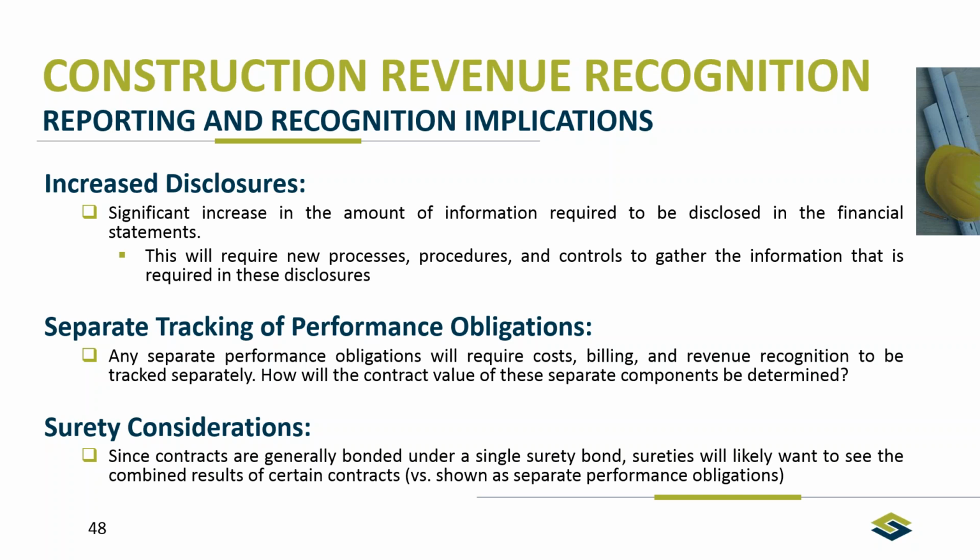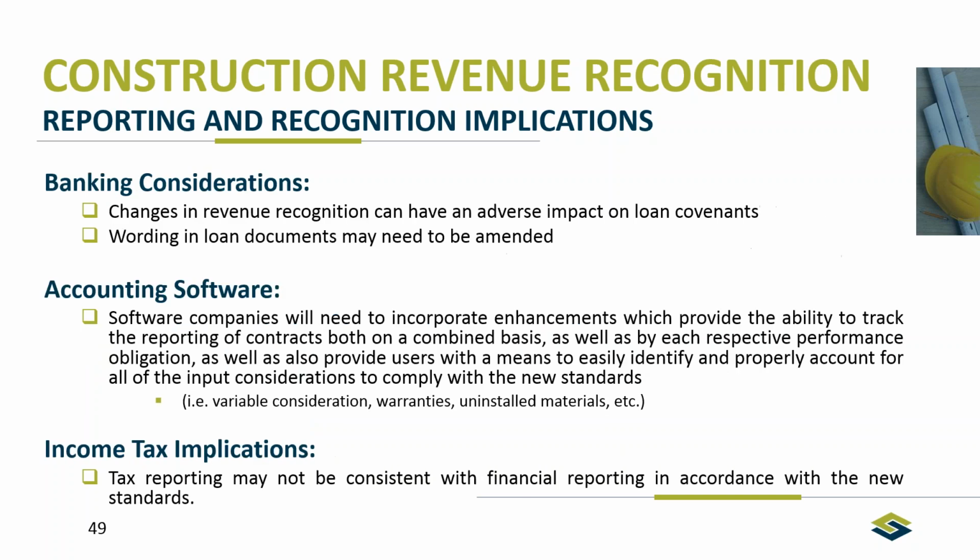Surety considerations. Since most contracts are generally bonded under a single surety bond, the sureties are probably going to want to see the combined results of certain projects. They're not going to want to see them broken out into separate performance obligations. So that may be something that we're going to have to consider as well.